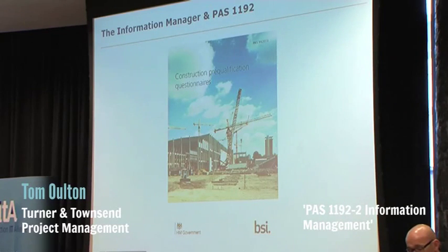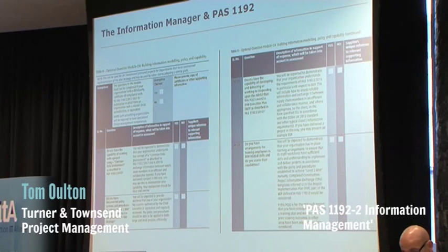The information manager is also responsible for the supply chain assessment. PAS 91, 2013, is the PQQs for the construction industry, which contains this Table 8, which asks for prospective contractors for their BIM experience. It provides a common framework so that your information manager can assess the supply chain on the same criteria.